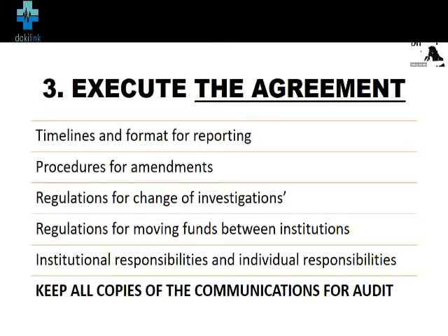It is so important to keep all forms of communication. If you have to change anything in the policy, in the agreement, you must document the communication on that for auditing purposes.